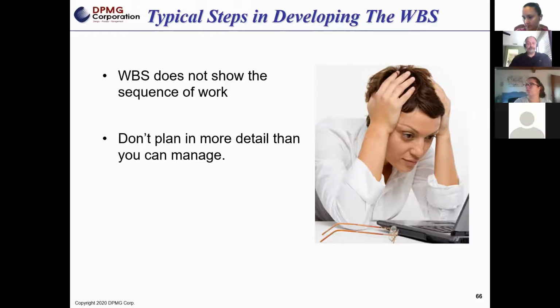You're going to assign a team member to be responsible to ensure that work gets completed. It doesn't necessarily mean that they're doing the work, but that the work gets completed. Then it becomes the responsibility of that team member to break that work down to the level where the work is being done, right?